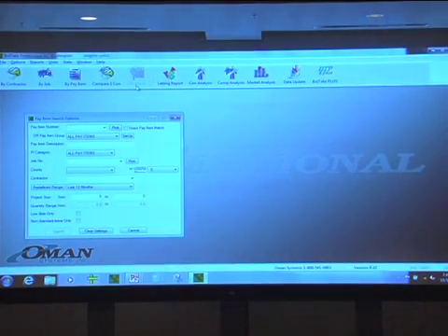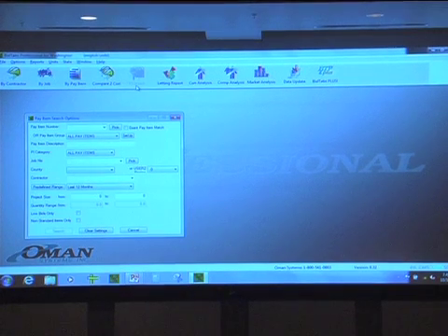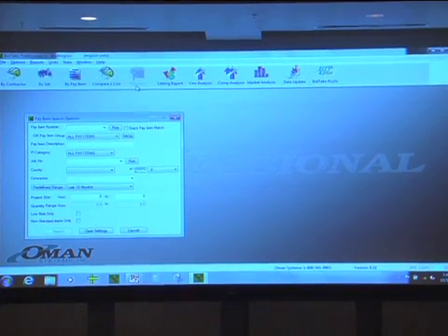Now we can use this to search standard items, but we can use it to search non-standard items as well. And when you're looking for your non-standard items, what's associated with them is the contracts as well, so you can go pull those contracts and see the specific quantity, location, and other associated items that had to be installed with that item.